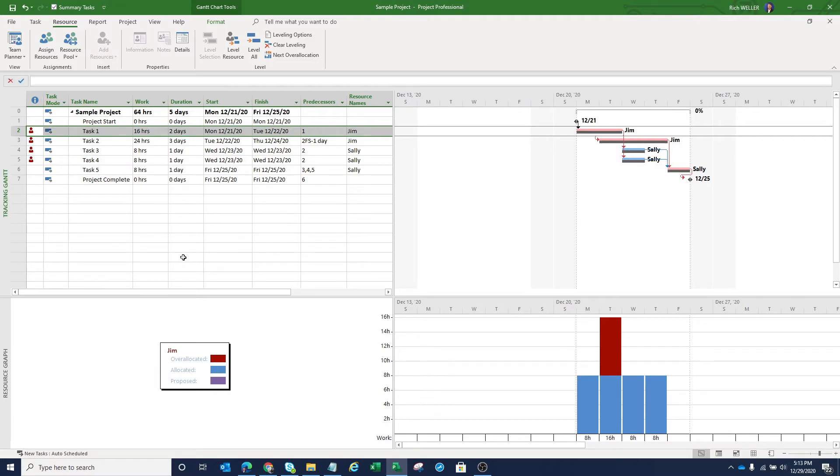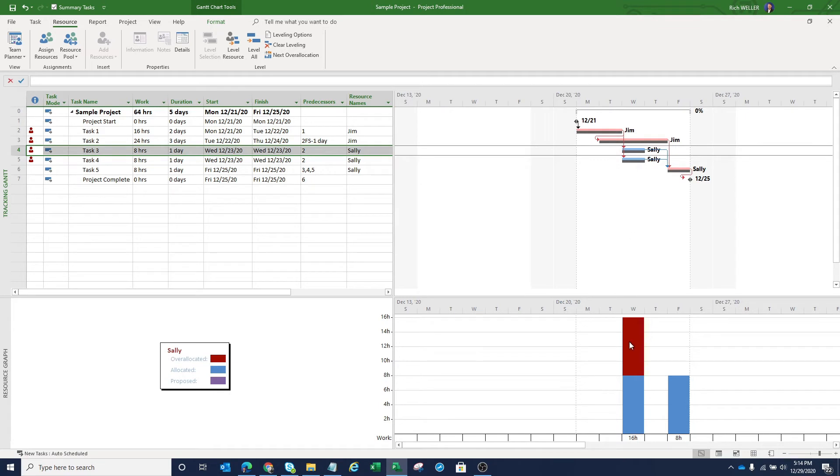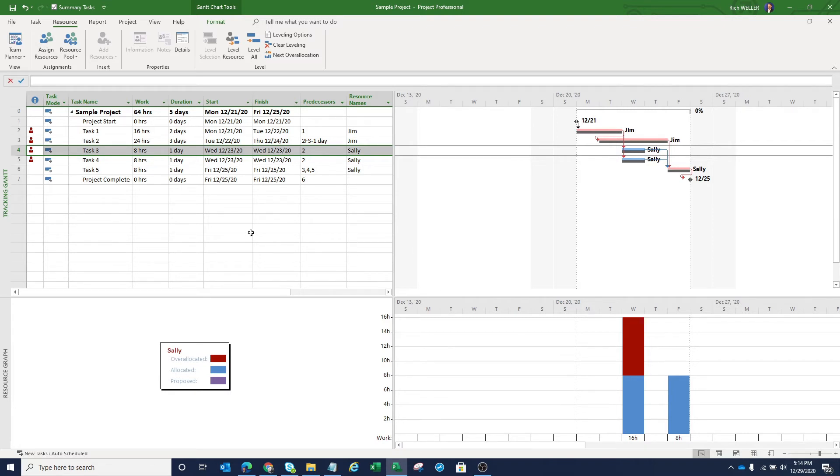That shows us that we have an over allocation problem with respect to Jim. If we click on this task three here, we can see it's tied to Sally. And Sally as well, she has an over allocation on Wednesday in which we're asking her to complete two different tasks. When we stack them up on top of one another, we're asking her to complete 16 hours worth of work in just one day. And she can only provide or deliver eight hours worth of work.